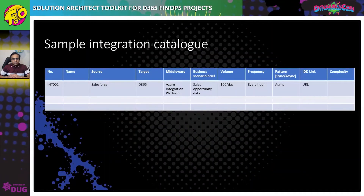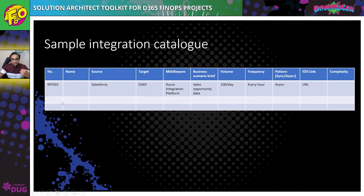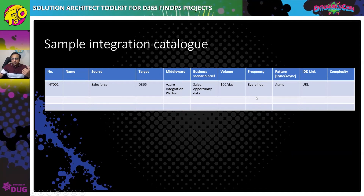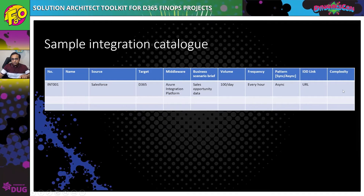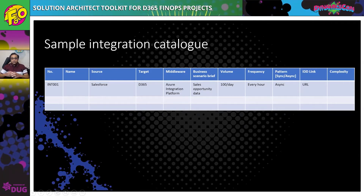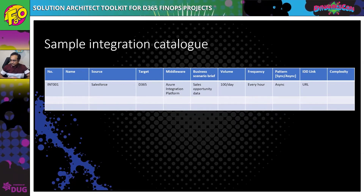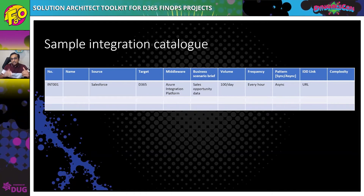A sample integration catalog may look like this: define each integration with a unique reference number, then capture the source system, target system, middleware, a brief description of the business scenario, the expected volume, and the expected frequency. These help you determine the integration pattern. You can also store a link to the detailed integration design document and capture the complexity of the integration. As a solution architect, having this view gives you good information handy for discussions with Microsoft, the customer, or your own team, and lets you track progress. Start defining the structure from the beginning of the project and keep maturing it as you progress.